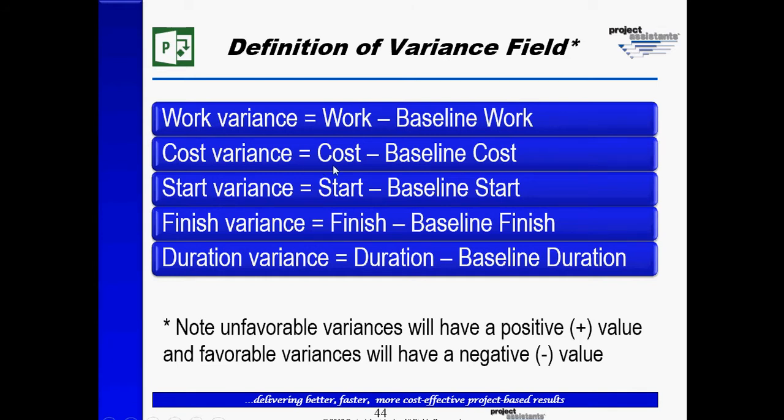As you may recall, the cost field contains the current estimate of cost. This field is often calculated by multiplying rates times hours, or in some cases, even material costs.